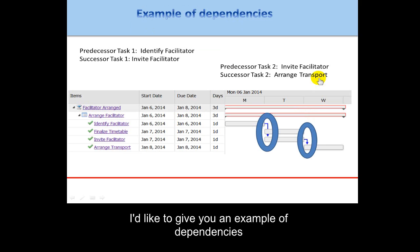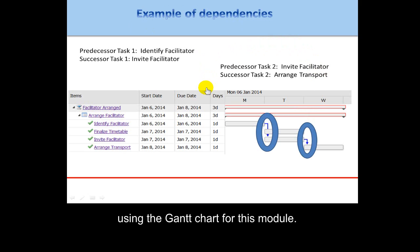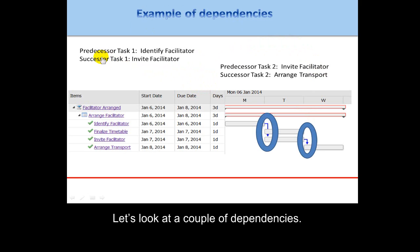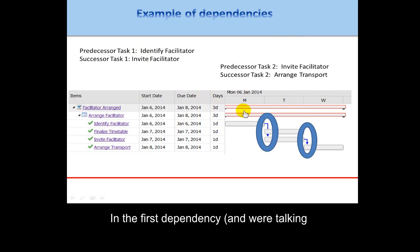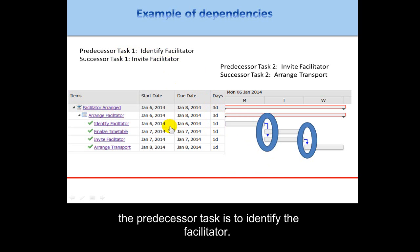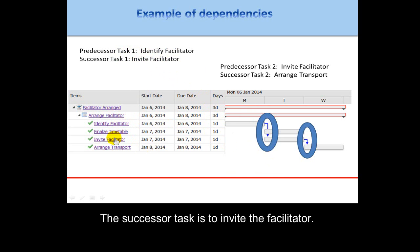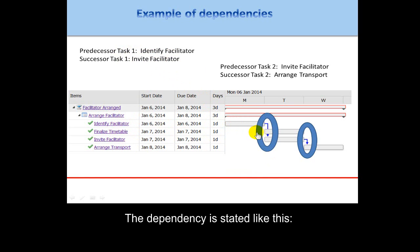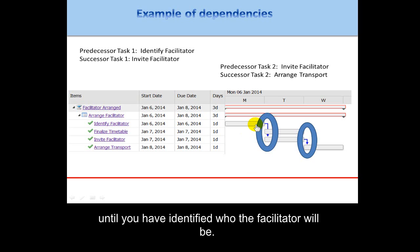Let me give you an example of dependencies using the Gantt chart that is the sample for this module. In the first dependency shown here, predecessor task one is to identify the facilitator. The successor task is to invite the facilitator. The dependency is stated like this: you cannot invite the facilitator until you have identified who the facilitator will be.